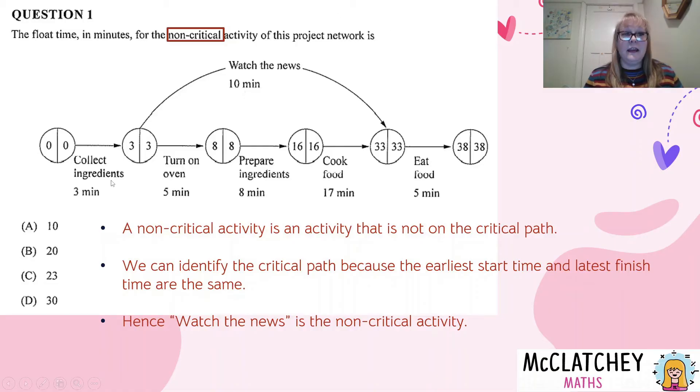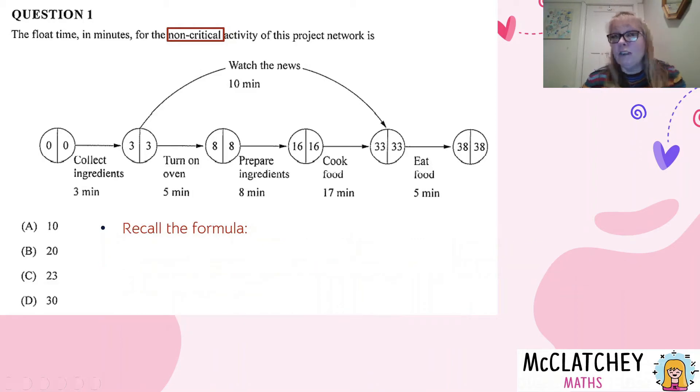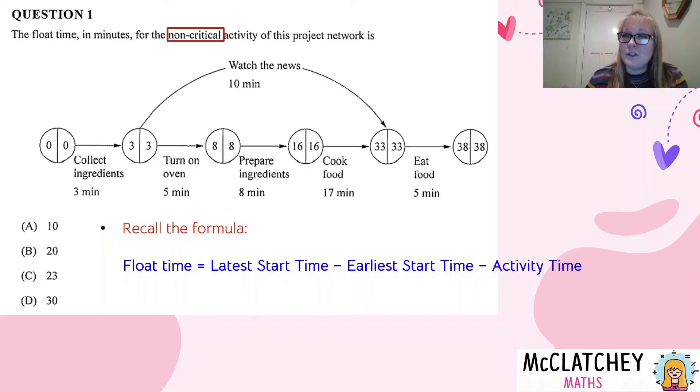It's tempting to think that the answer is A, because A matches our non-critical activity, but that is not the case. We have a formula that you should have memorized for float time. It is the latest start time, take away the earliest start time, take away the activity time.